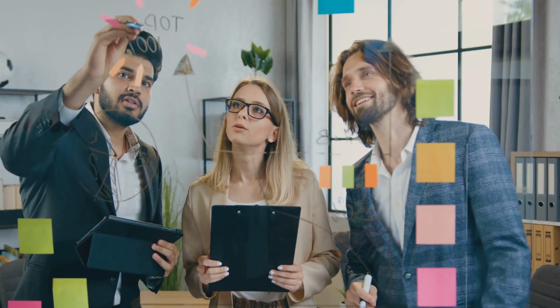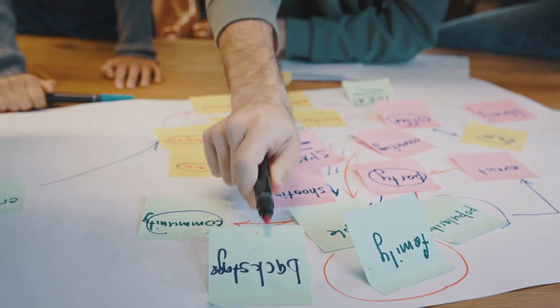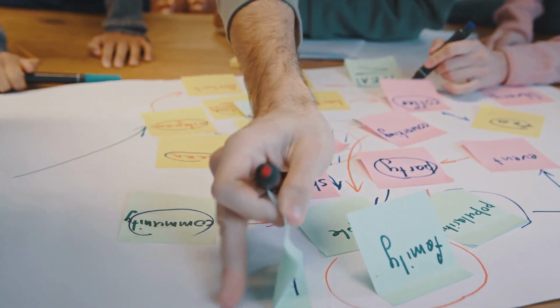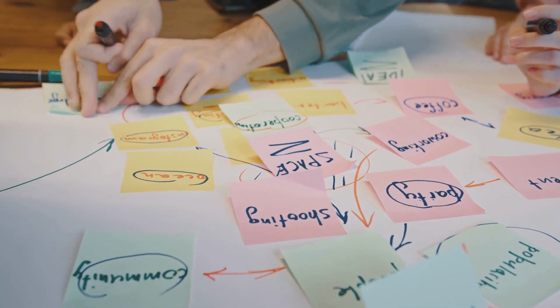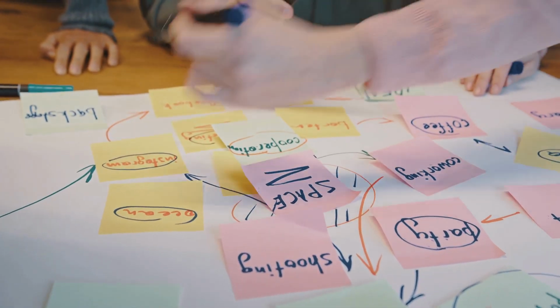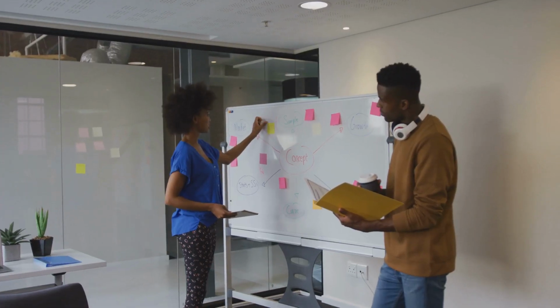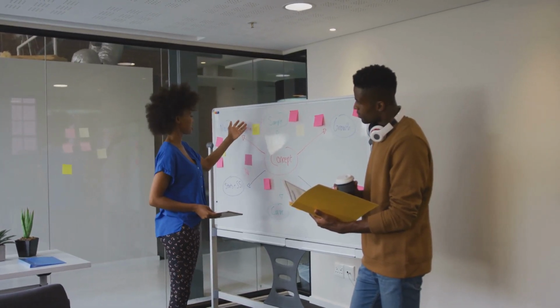The reasons for a spillover can vary significantly. One common cause is underestimation of effort. The team might initially estimate that a user story can be completed within the sprint, but as they progress, they realize the scope is larger or more complex than anticipated. Another frequent cause is large user stories.